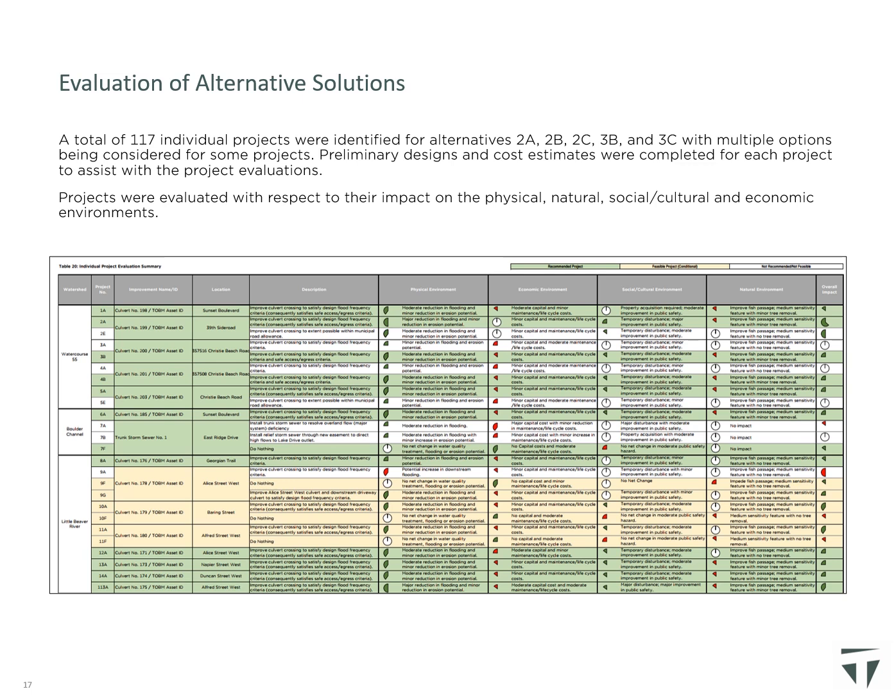Based on the severity of impacts to the 4 project environments, both positive and negative, a score was assigned to each alternative solution for each of the 4 project environments. The scores for all 4 project environments were then summed, and the final score was used to identify the option with the most positive impact across all project environments for inclusion in the preliminary preferred solution.